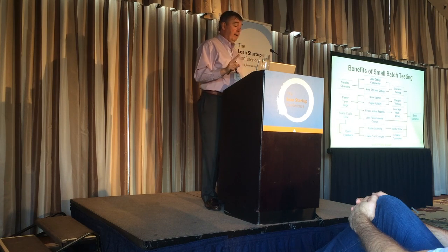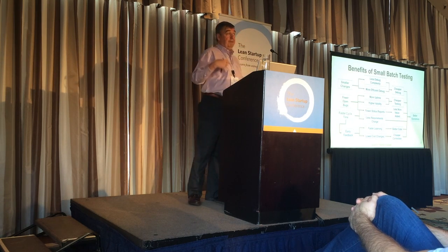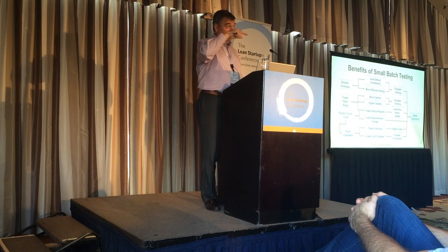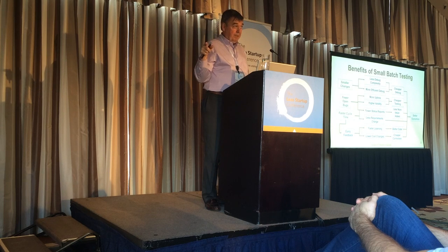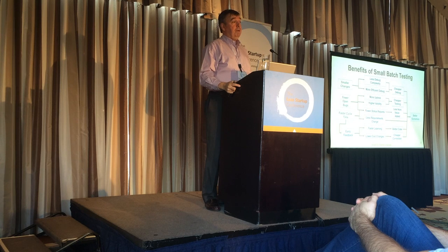Huge reduction in overhead. Smaller changes in the code means less debug complexity. If I change one line in the code, one line can be broken. If I change two, it's line 1 or line 2 or an interaction between 1 and 2. Interactions go up roughly with 2 to the nth, n being the number of things you're changing. So you get a huge increase in the difficulty of debugging. Anyone who has ever done batch size reduction in software processes is a believer in reducing batch size ends up improving the economics.